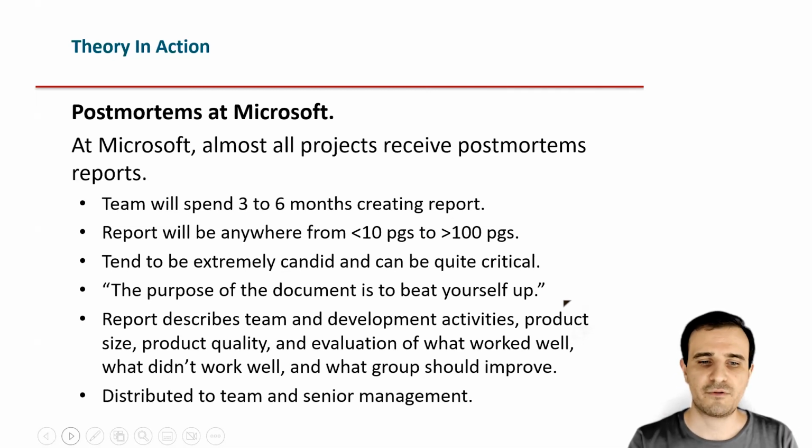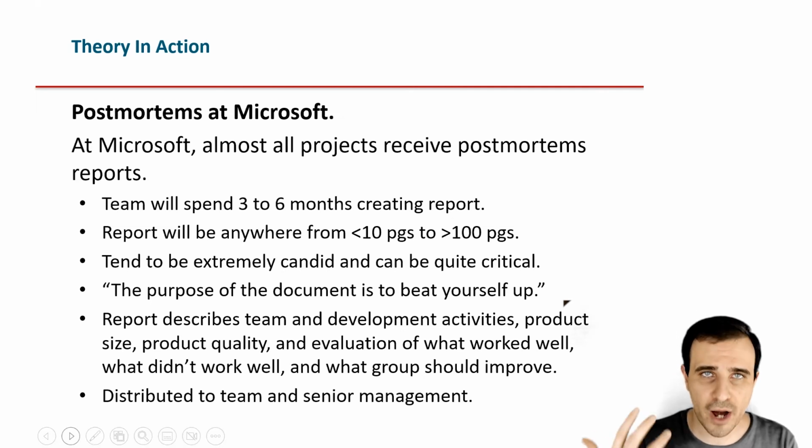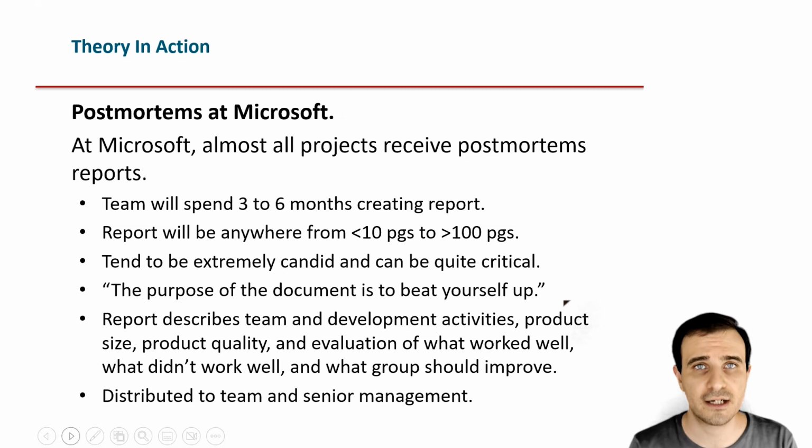That can be anything between 10 to 100 pages. This must be candid, must be critical. As Microsoft states, the purpose of this is to beat yourself up, even if the project was successful. So it's a way to really reflect and learn on the new product development process.